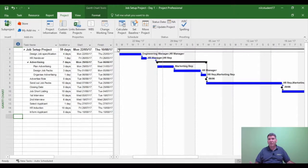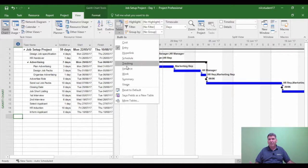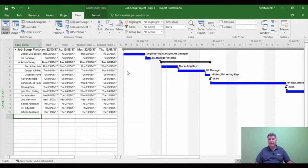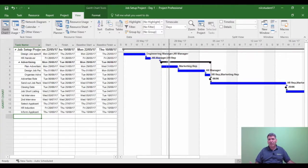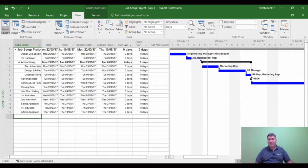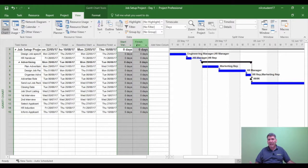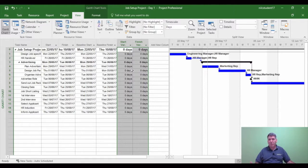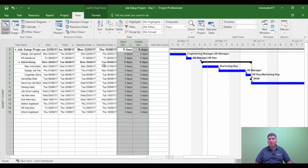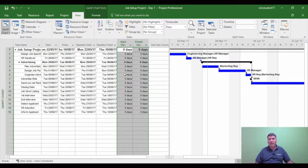So if I now go back to my variance table, view tab, tables, variance, I can now see the baseline has been set. So when the project starts now and goes live, if anything were to change, I'd now have a date variance from the baseline. So the dates could either come backwards or go forwards according to whatever happens within the project. So that's one of the big reasons of setting the baseline. You've then got clear coverage of what's happening within your project.